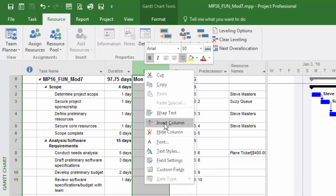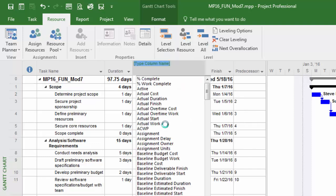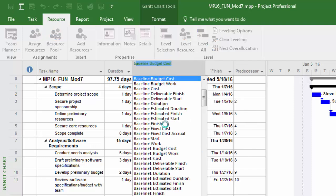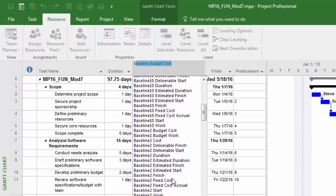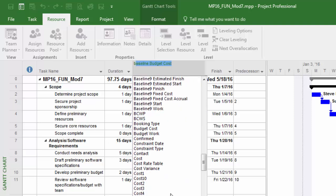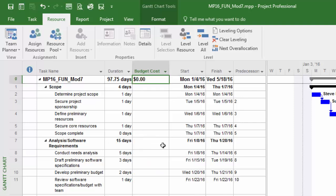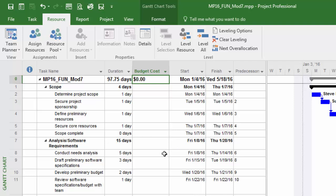I'll hit insert column and look for budget cost. Notice there's a zero value in there. If I click on that budget cost and try to type, it doesn't allow me to do it. The expectation is that this budget cost is going to allow us to compare it to the actual cost of the project so you can always make that comparison.